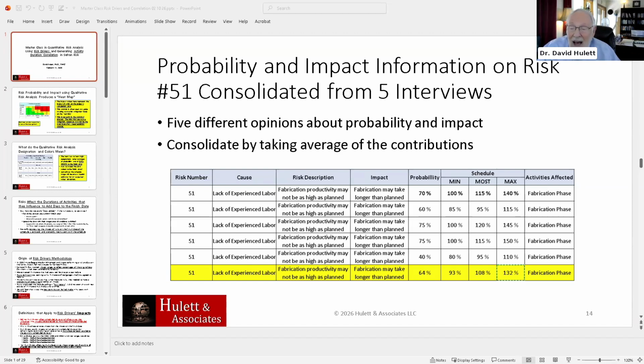By the way, I'm using now a lot more uniform distributions because I don't like the fact that triangular distributions have almost no probability down to the minimum and out to the maximum. You may not get any probability that is meaningful. Oh, look, I've got a lot of thumbs up on that one. Anyway, I like to use a uniform distribution where the probability is equal through the whole distribution.